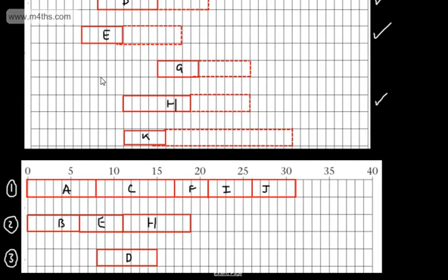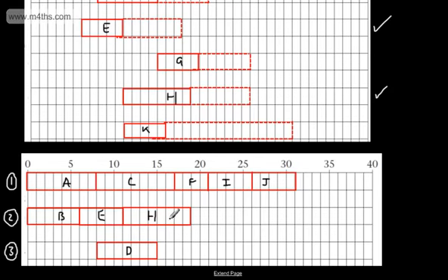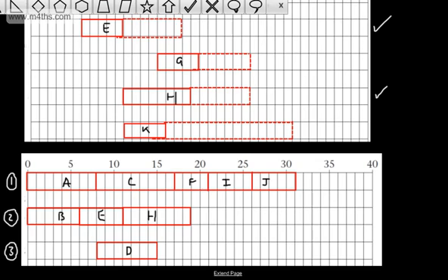So at this stage now, I've got a choice. So activity H is being completed by worker 2. They're still busy. We've now got activity D completed. So I've got the choice now of G or K. We can see K can be completed a lot later. Therefore, my justification for choosing G for worker 3 is that we've got an earlier late event time. Therefore, we're going to allocate G to worker 3.